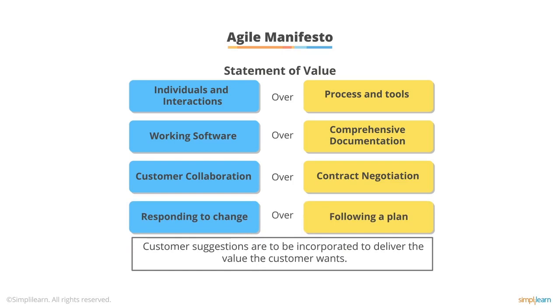Responding to change over following the plan. In Agile, small pieces of working software are delivered to the customer incrementally, and the customer is involved in the project from the beginning to the end. So in Agile, we are responsive to the customer and willing to make even mid-course corrections in order to deliver the value that the customer wants.